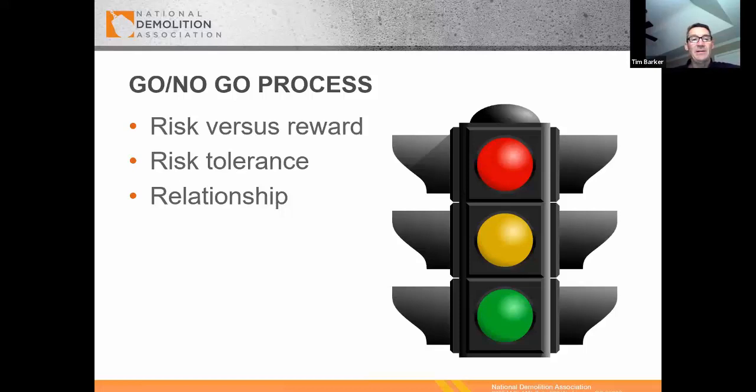So sometimes there are things, maybe projects are too small for you or too big in your area, or you look at the competition and realize this is probably not the best fit for us. You look at the risk associated with the project and you decide at that time, based upon this risk versus reward in your relationship with the client, if you're going to proceed with pursuing the opportunity or pass on it for something better.